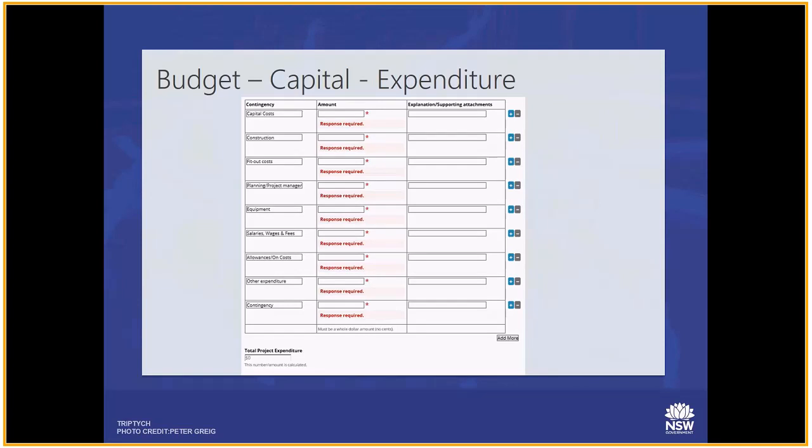Developing a realistic project budget assists assessors to understand how you would monitor and control costs, ensuring the project finishes within budget. This needs to include the project contingency. Contingency is the estimated cost for the unknown work, such as activities taking longer than planned, unforeseen issues, price rises in materials, etc. The contingency that you put into your budget is based on the size and scale of your project.